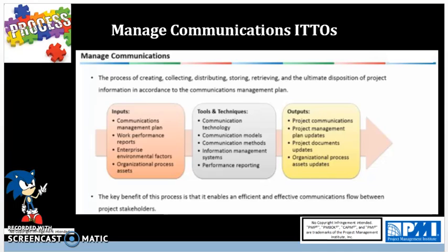For example, let's say that we had schedule delays. That raw observation is going to be interpreted as information. So let's say we had a resource that was sick and that impacts our critical path. That would be a form of raw observation, and the fact that the person's absence is impacting the critical path is an information, work performance information example.